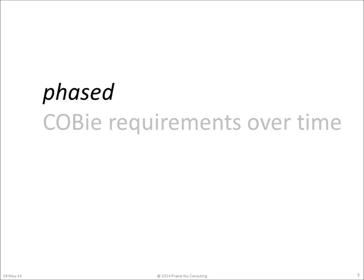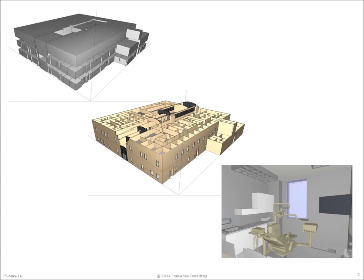The requirements to deliver COBie data are phased in over time. That's a good thing because we don't know all the COBie data at the beginning of the project. Initially, we'll know information about the blocking and stacking of various spaces. Then we'll begin to explore the actual walls and the architectural configuration. And by the time we get to the construction document stage, we have everything we need to build the building.